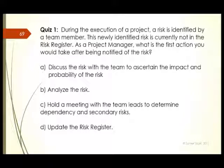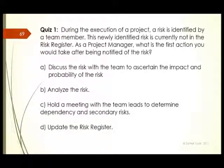The correct answer is B — analyze the risk. Before you put that risk into the risk register, you need to look at it and determine whether it is a real risk or not.